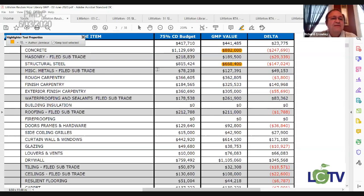And what we'll do is make sure that those allowances and those holds are being done judiciously. If we start seeing a laborer on site, and again, it's small dollars, and Steve and I have had this discussion, if you start seeing somebody on site who's really not adding any value, maybe they've got a laborer on board who ultimately becomes very well utilized. But if you see 4 laborers on site that are just under these general allowance categories, well, we're going to call them out on it.